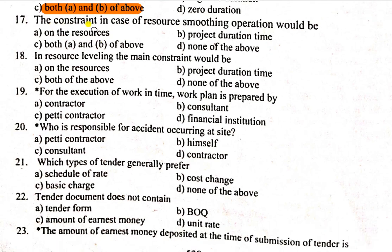Similarly, the constraint in the case of resources smoothing operation — what is resources smoothing? I have a project and the resources are available to you. So in resources smoothing, the time period is fixed — you have to complete the project within the given time. So the restraint in the case of resources smoothing would be on the project duration.